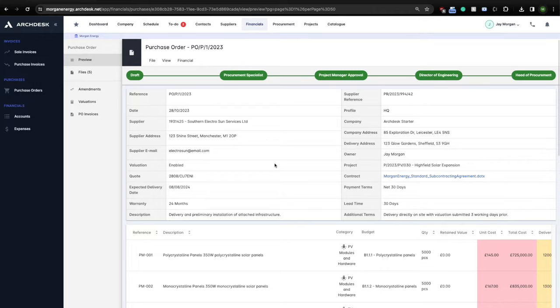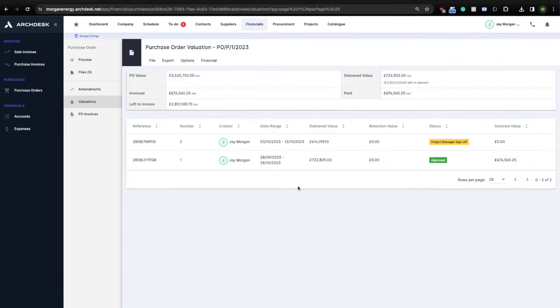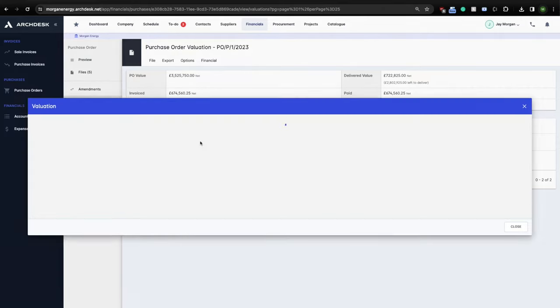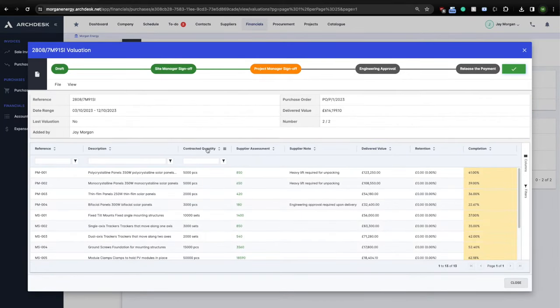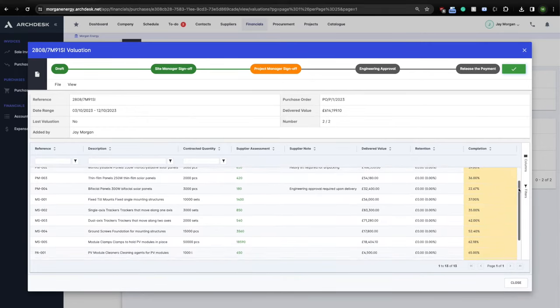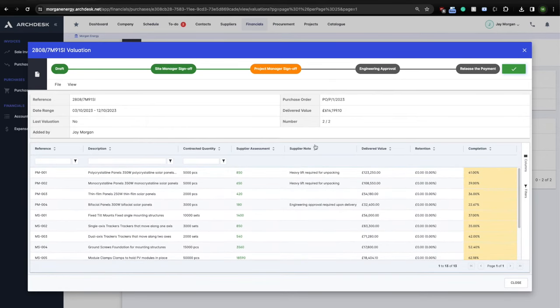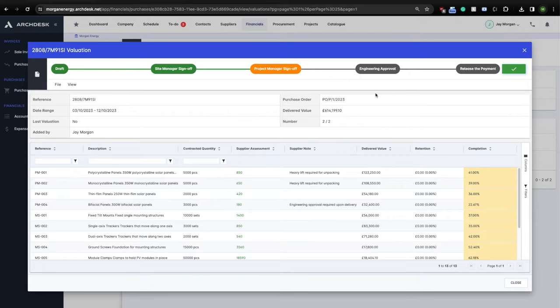In this case, we can see the supplier has submitted two reports. Let's have a look. Here we can see the supplier is claiming that they have delivered works between the 3rd of October and the 12th of October, worth $614,199, that they would like to get paid off. The actual items with the delivered quantities are displayed below. Of course, if we do not agree with this valuation, we can make our own assessment of the work completed. Once the valuation is approved, it's now the supplier's job to send you the invoice.